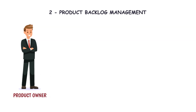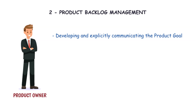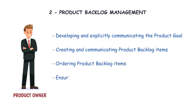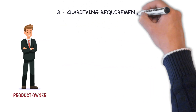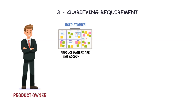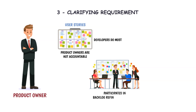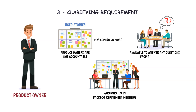As the Scrum Guide says, a product owner is accountable for developing and explicitly communicating the product goal, creating and communicating product backlog items, ordering product backlog items, and ensuring that the product backlog is transparent, visible, and understood. Lastly, clarifying requirements — product owners are not accountable for writing user stories and acceptance criteria; it is done collectively by the Scrum team, where developers do most. Product owners participate in product backlog refinement meetings to help everyone understand backlog items by communicating purpose and answering developers' questions, and are available to answer any questions from developers during development to meet the sprint goal.